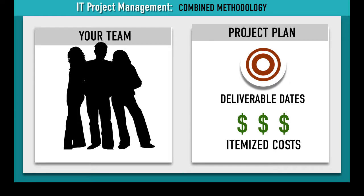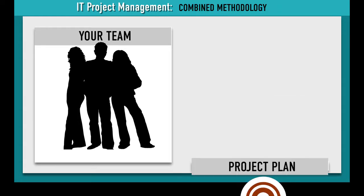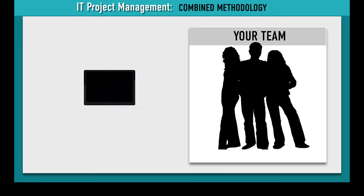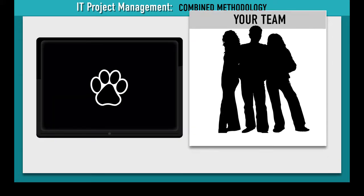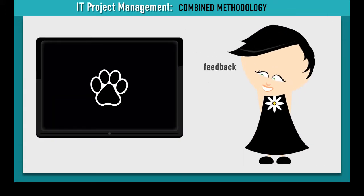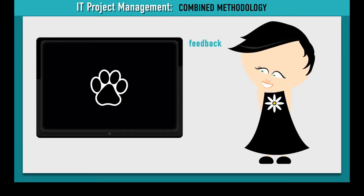Once the project gets started, your team switches to Agile and works in iterative cycles to provide Daisy with a working prototype within a week. Daisy and her clients test the prototype and provide feedback.